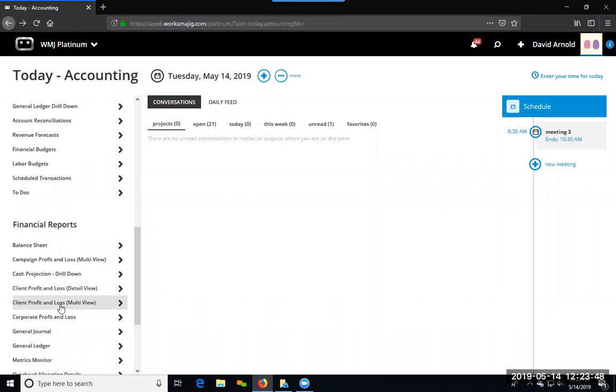Okay, so the write-off options that are coming on a billing worksheet, those apply once the worksheet is approved and either it generated an invoice or there's nothing to bill, so it's automatically approved. The transactions themselves would have the write-off. And from the project, I can see the write-off reason for those transactions.